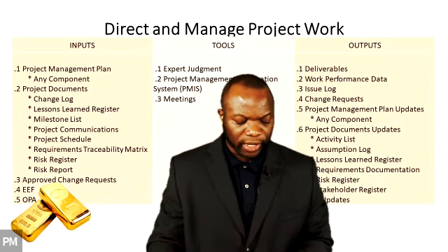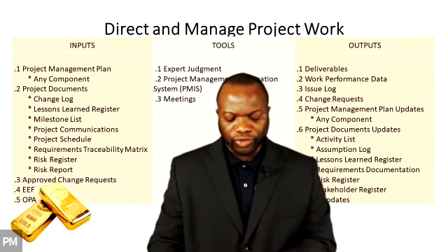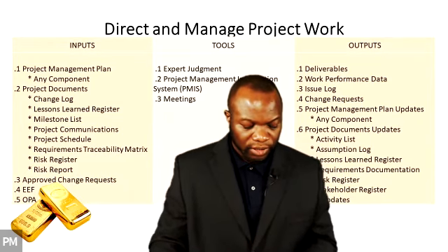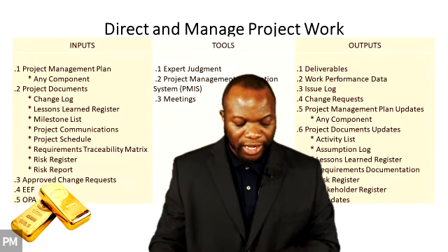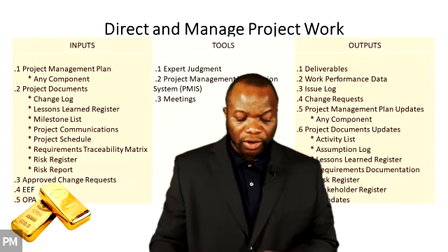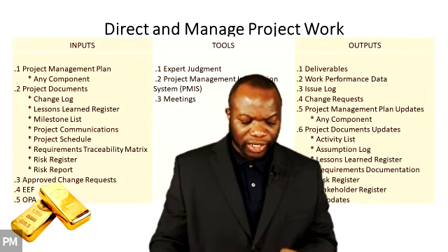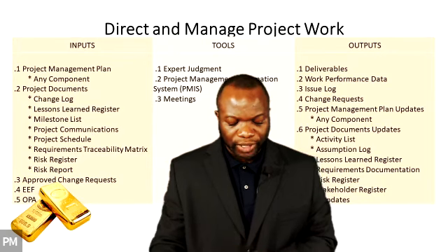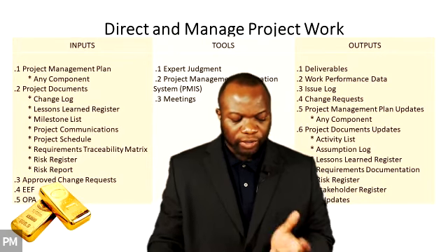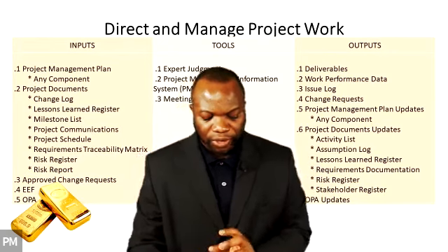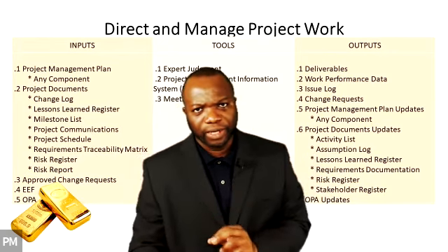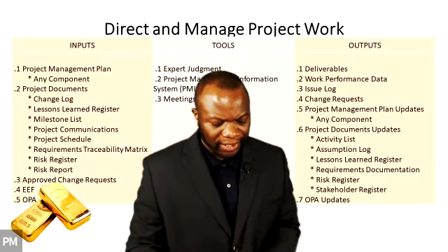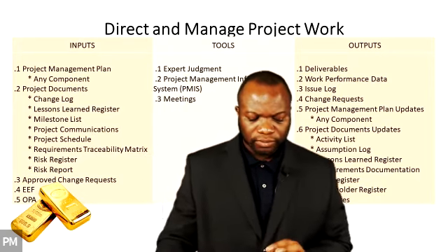The issue log will help the project manager effectively track and manage issues, ensuring that they are investigated and resolved. The issue log is created for the first time as an output of this process, although issues may happen at any time during the project. The issue log is updated as a result of the monitoring and controlling activities throughout the project's lifecycle. As you are monitoring and controlling the project, you're getting a better understanding of issues. This is on page 96. Okay?